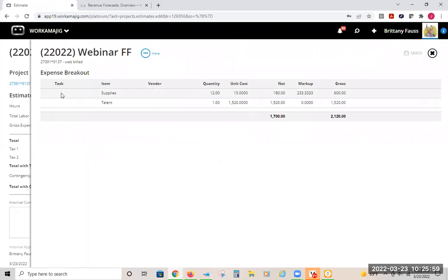And then if we look at the expenses, this is what I was talking about with task. I mentioned earlier, where if you're dividing your expenses evenly or something similar to that, then what does it do if you actually have a task listed for an actual expense? It would then look to the task date and then put the expense within that month, the whole expense, rather than dividing it evenly. So I have two different expenses.